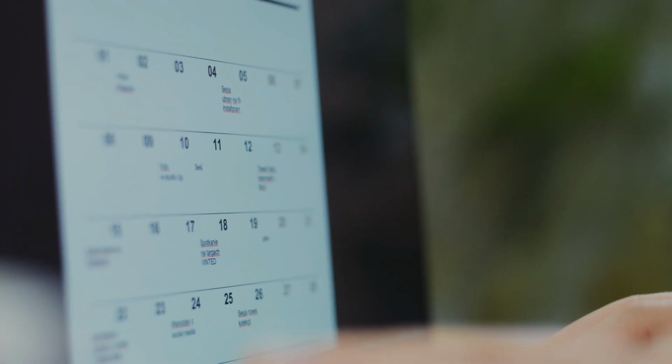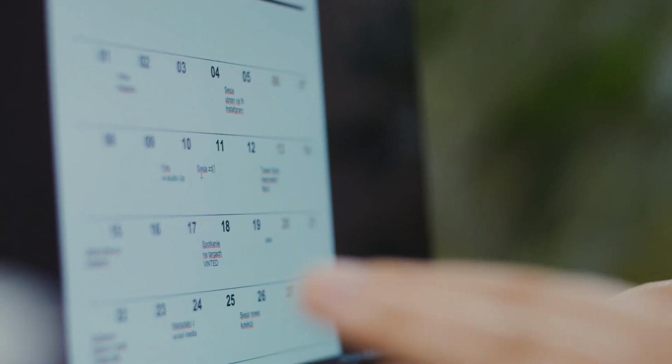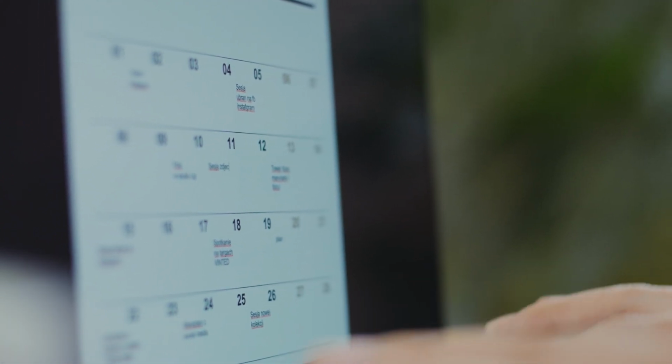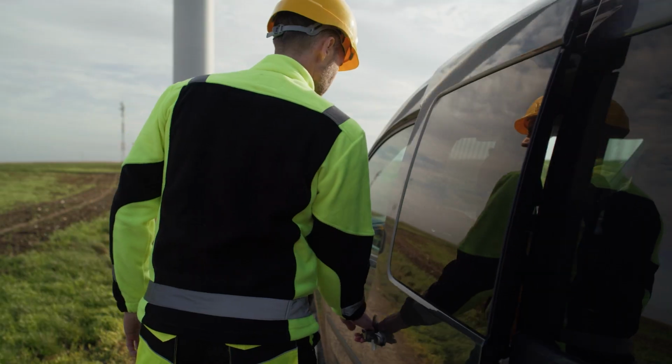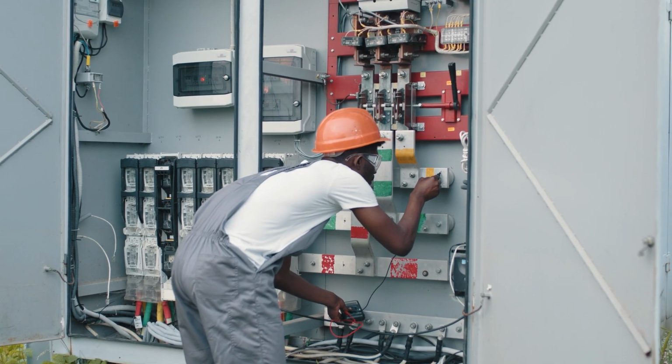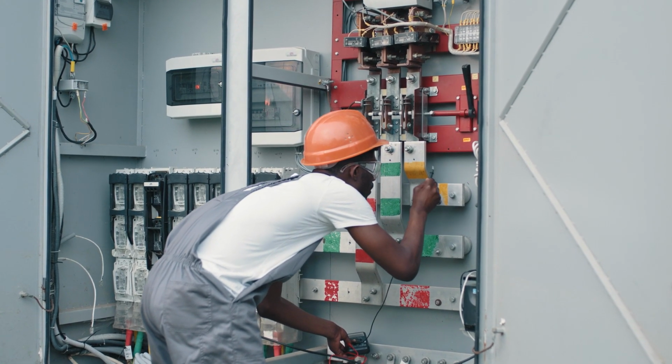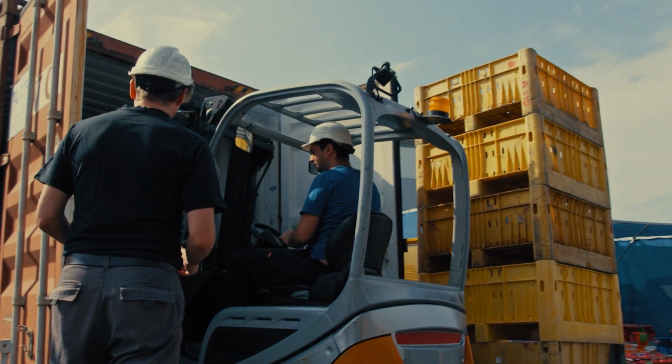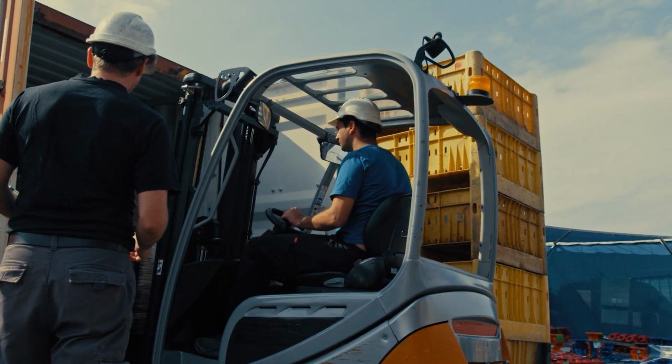So after estimating, next thing you want to do is scheduling. So this is generally your Gantt charts, or you might have a card view, depending what you are. If you're doing renovations, home building, general contracting, you're going to have Gantt charts and a pretty elaborate and built out scheduling section of software. If you are doing more service calls where you've got multiple sites per day for technicians or people going out mowing a bunch of different lawns in one day, or servicing a bunch of different furnaces or what have you, the Gantt chart's not going to be as useful.